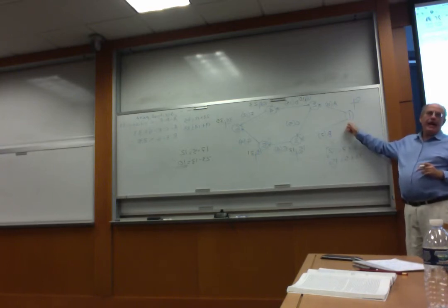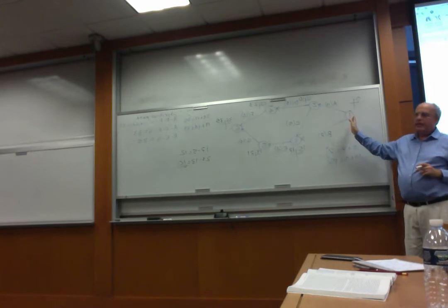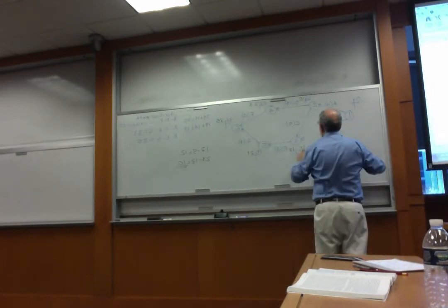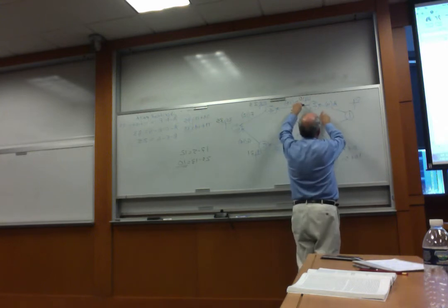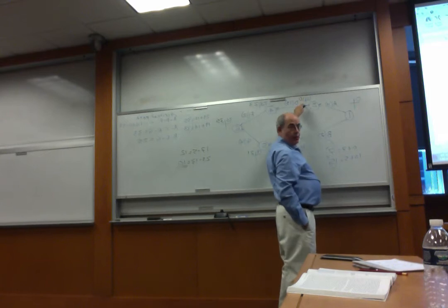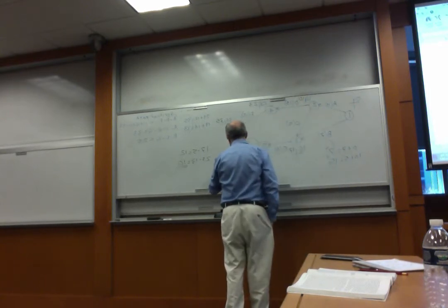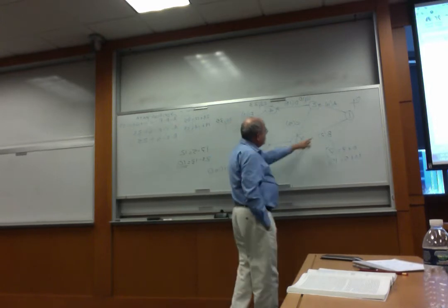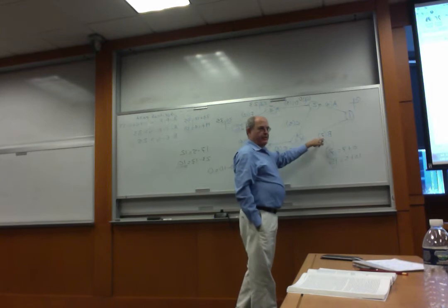1. How can we get to 1 going backwards? Again, 2 different ways to get there. We can get to 1 from 2, and we can get to 1 from 3. So one way is to get there from 2. If we choose the path from 2 to 1, 10, but which 10? The black one. 10 minus 10, 0. And the other option is to get to 1 from 3. The value will be 17 minus 7.